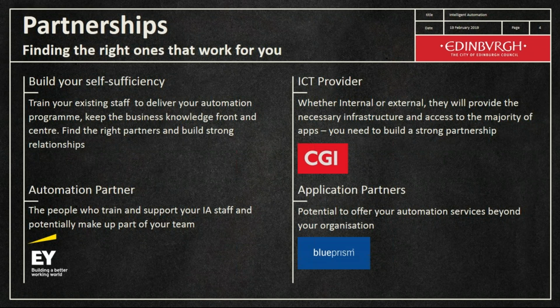I would say that we had one supplier who I'm not going to name, but they gave us an absolute no way. They actually came back later on with an offer that required us to buy new licenses at £7,000 per license with a minimum purchase of 5 licenses, so 35 grand. And that was for less than 1 year.